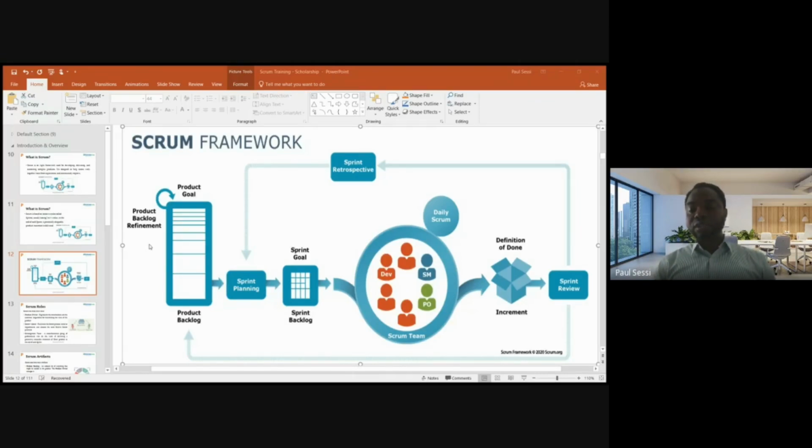And what are the 2 of those things that are first? Landing page and then the ordering process, right? So landing page and the ordering process, and then we'll take the other 2 in the next sprint. So what we do is we move those 2 goals to what we call the sprint backlog, right? So from this sprint backlog, then we assign tasks.